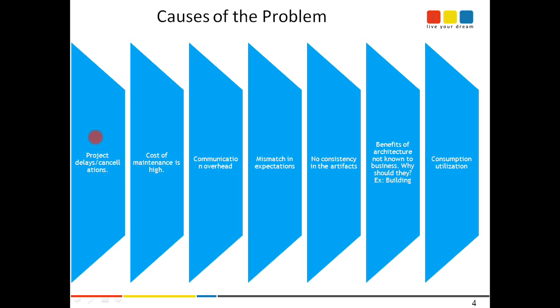You might say, how does this confusion about architecture result in project delays and cancellation, right? Let me give you the scenario. Basically, you create an architecture document and submit it to your customer. Customer comes back, no, no, no, this is not what I'm expecting. I want an architecture that means so many other things. So it will come back to you, you try to make the changes, and then go to the customer again. So look at it. The architecture phase that was originally given for 2 weeks might extend to 4 weeks. Even though it might extend to 4 weeks, you might not successfully complete the architecture. Again, the fundamental reason for that is because all the stakeholders don't agree upon having a consistent scope and consistent definition for the architecture, isn't it?